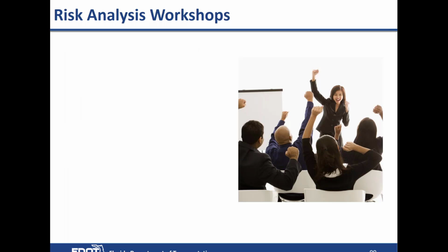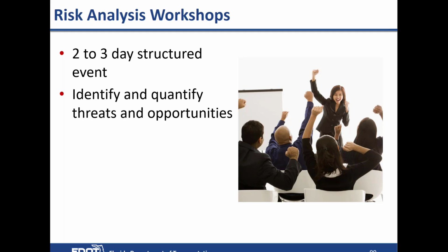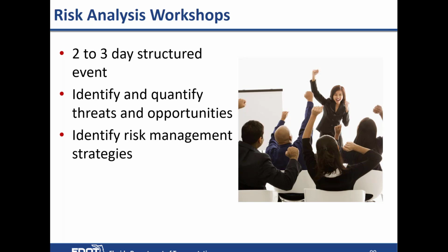Well, I described what a VE study is, and typically it's a 5-day study. The risk analysis is really a 2 to 3 day study. It's a very structured event. It's to identify and quantify threats and opportunities, or risks, and identify possibly some management strategies to mitigate those risks. It's a collaborative team approach.